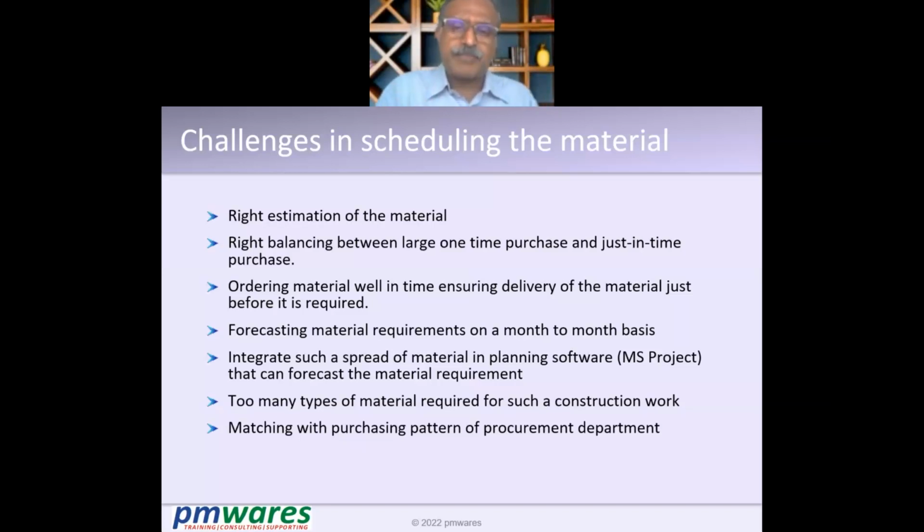If you are not procuring all the tiles in one go, and suppose you purchase some tiles today and some tiles after 6 months, you will see that whatever you do, however close they are, they still have variations. So to avoid these variations, the builders buy the complete tiling requirement of the complete project, or at least a complete building, in one shot, so that there will be no variations.